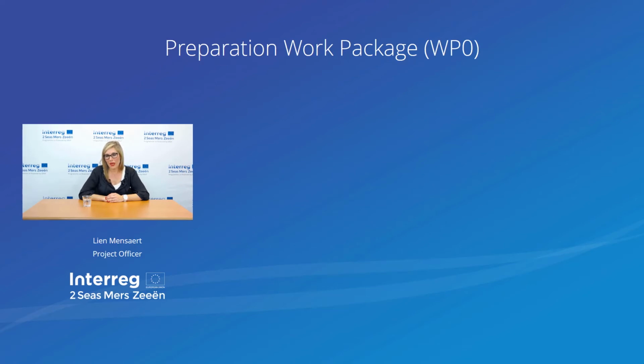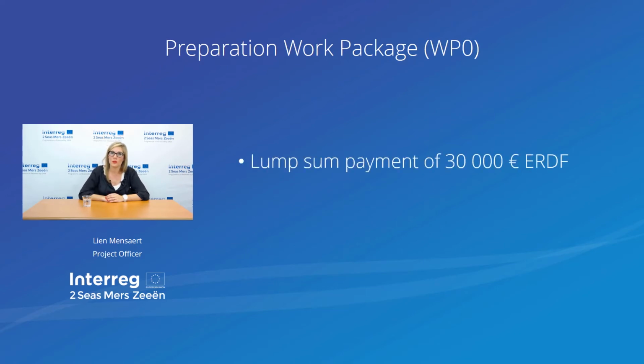The first work package is work package 0, called the preparation work package. This is a work package that will be very similar for all of our approved projects and will contain all of the actions that were undertaken as a preparation for the project, so until the submission of your application form. To finance all of these costs that the partners incurred during the preparation, every project has the right to ask for a lump sum payment of €30,000 ERDF.